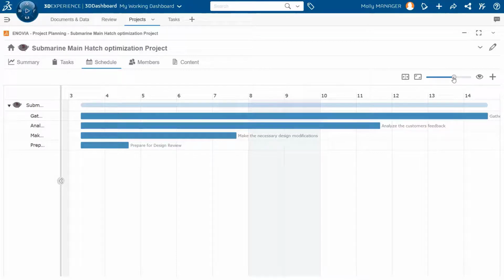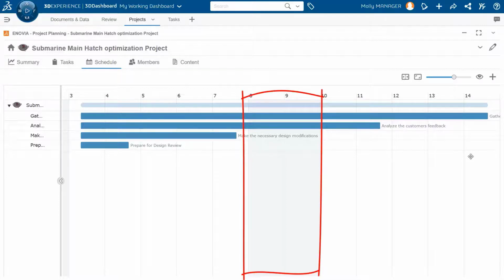The scheduler automatically takes into account any weekends, which are defined in the project calendar, and schedules the activities around the non-working days. So you can see the gray lines indicating it's a weekend, and the task is extended if it falls over a weekend.